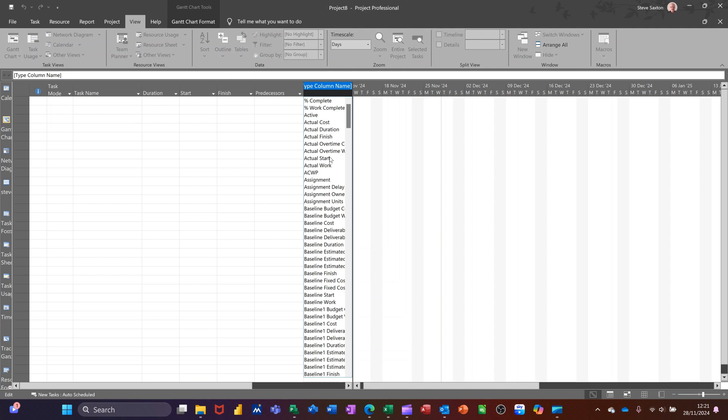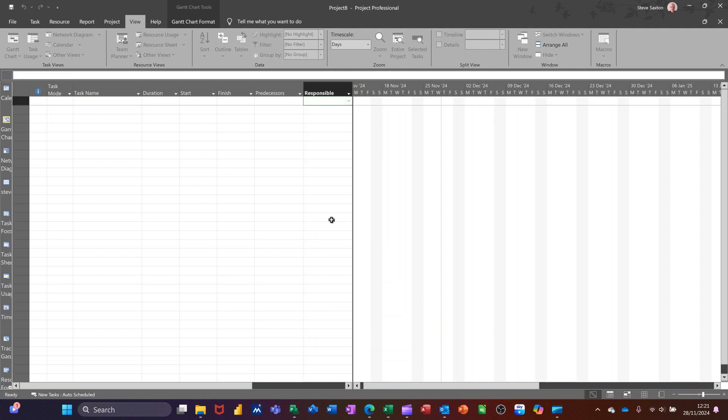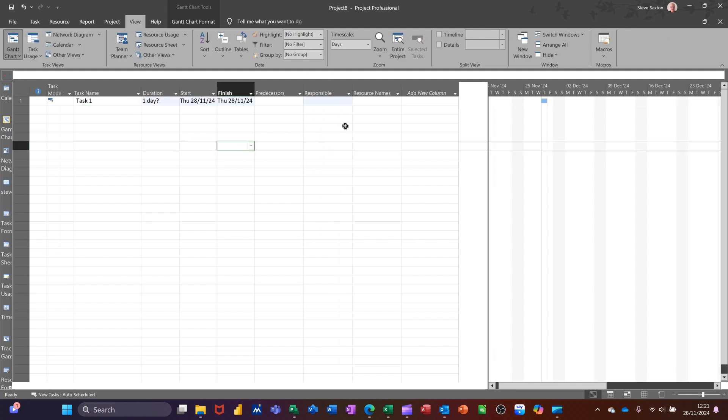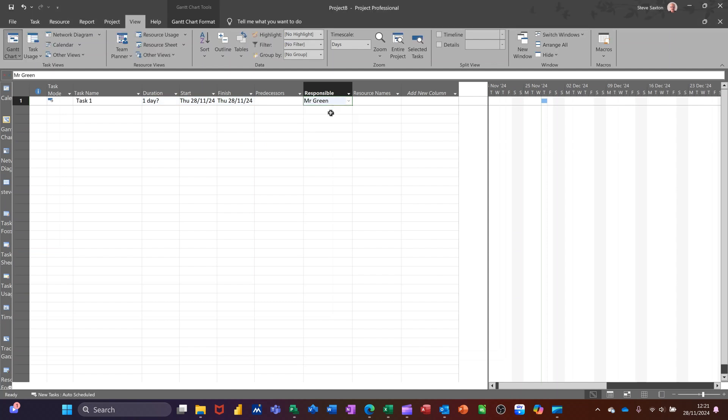and type T, I do have responsible text 2 because it's in the global template. And if I move this across, just give myself a task, task one, I will have the option there of selecting somebody from this drop-down list, which would be the person you would ring if there was a problem with that.